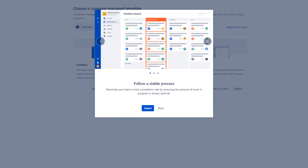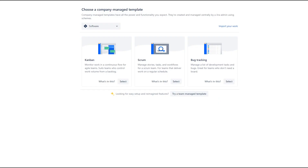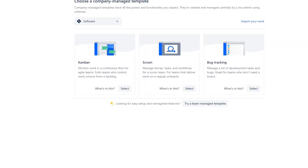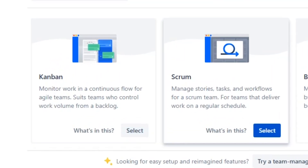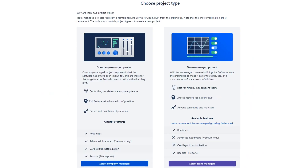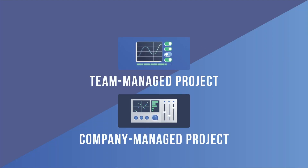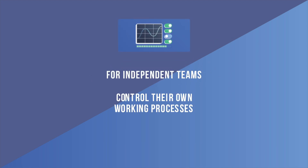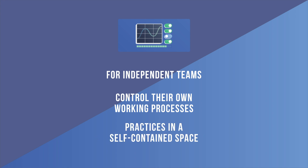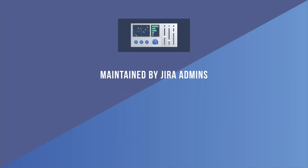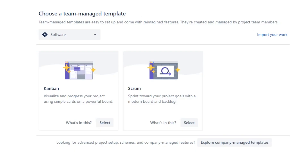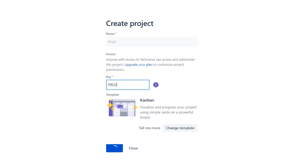Kanban is for agile teams that monitor work in a continuous flow, rather than in sprints, with a focus on managing in-progress work. Bug tracking is for teams that don't need boards and prefer to manage development tasks and bugs in a list view. If you choose either Scrum or Kanban, you will also be prompted to choose a project type: team-managed projects or company-managed projects. Team-managed projects are suited for independent teams who want to control their own working processes in a self-contained space. Company-managed projects are set up and maintained by Jira admins, designed for teams who want a standardized way of working across many teams, such as sharing a workflow.